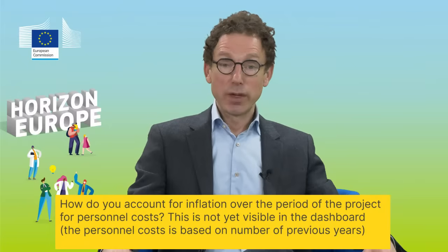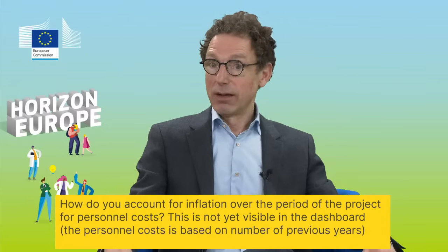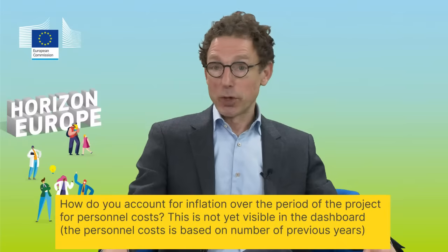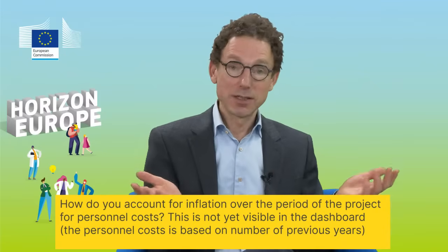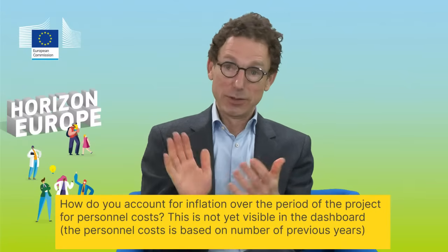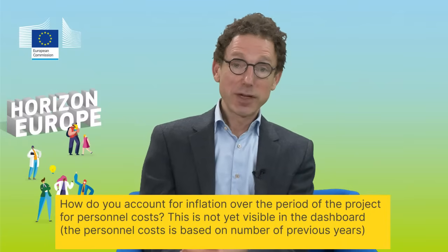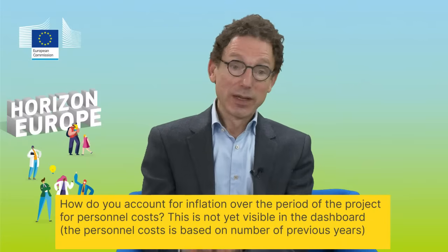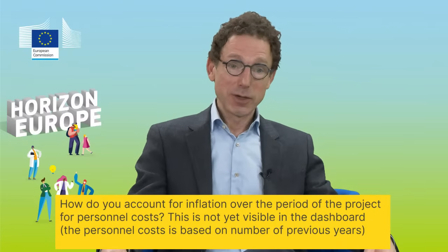The same is true if you have a particularly high share of senior staff in your project. Most projects have few senior staff and then more junior staff, but this of course differs from project to project. However, if in your project most of the staff are full professors, or more than half of the staff is full professors, you should certainly explain why that is so, because that is a bit unusual, and the experts might certainly have questions unless you justify that very well.